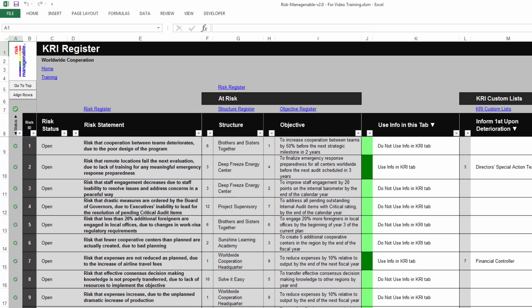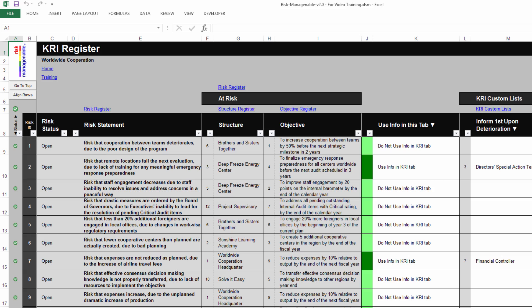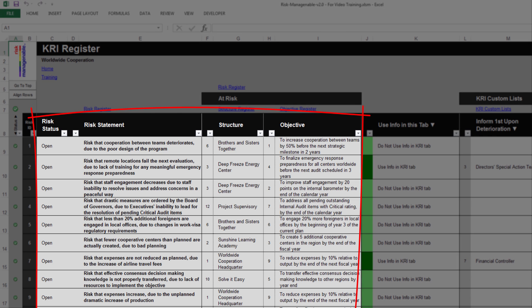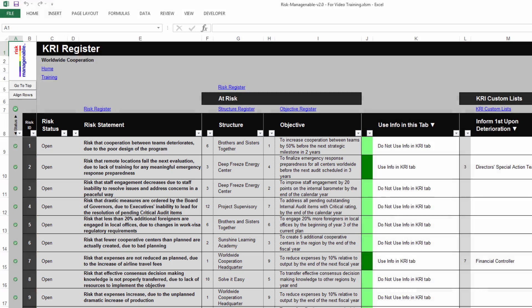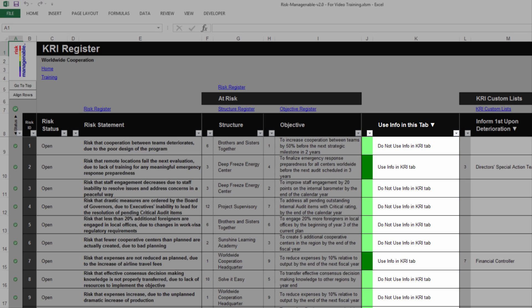In the KRI Register tab, the validity status of each record and the overall register is available in the leftmost column. The KRI Register tab is an extension of the Risk Register tab. Therefore, the first few columns are information extracted from the Risk Register tab — any input or change in these columns can only occur there. The column Use Info enables you, for each risk ID, to choose whether or not to use the features available in this KRI Register tab.